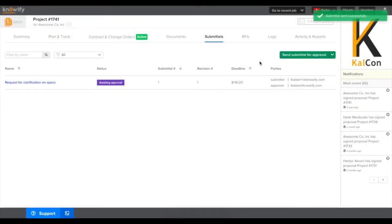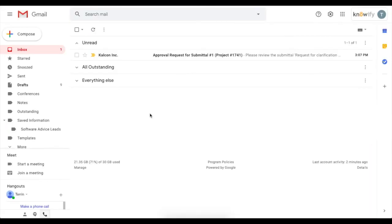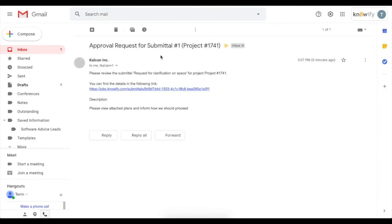Once this is sent, we'll see that it's awaiting approval in your submittals page. And the customer will get an email which will provide them with a link to review and approve or request a revision on your submittal.